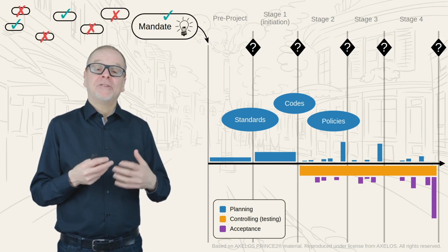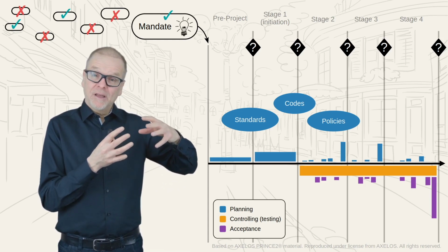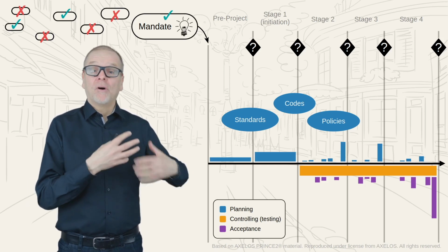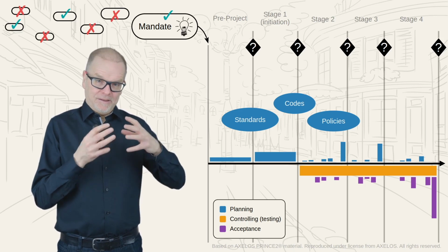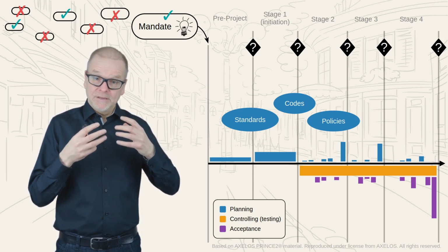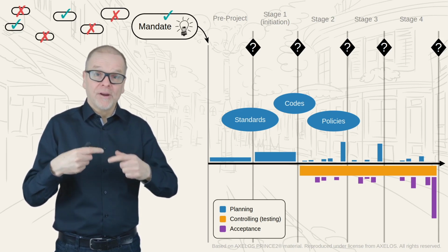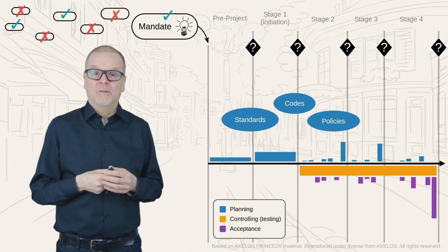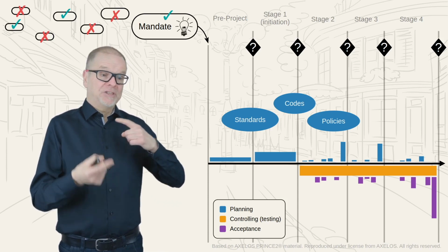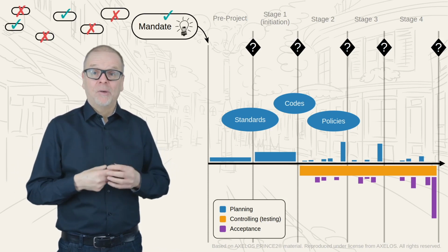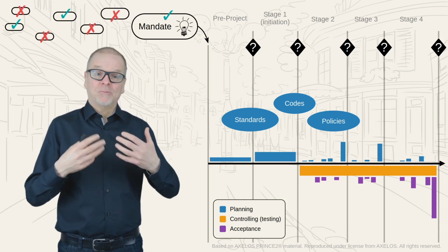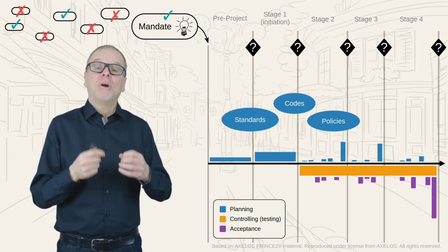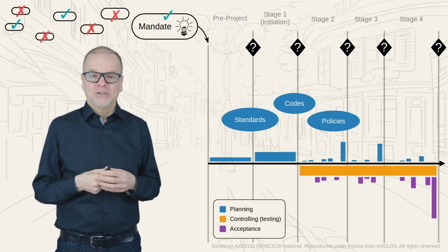Now let me do a more concrete example. Let's say that you're the project manager for a large construction site and you are installing very large concrete support structures for the building. And of course you're going to follow standards for all of the steps to prepare the concrete. Then further tests will be done as you progress and once the concrete is dry. So you will continually test before other parts are added. So why did we do that? Well, if we leave it too late and we check later, then we've got to start knocking down stuff that we have already built. So we must continually check as we are working because the cost of rework would be enormous, okay? So projects should always be checking for quality as we are adding to the project.